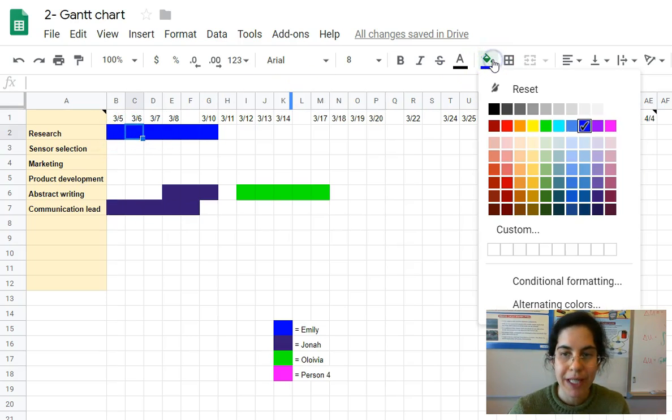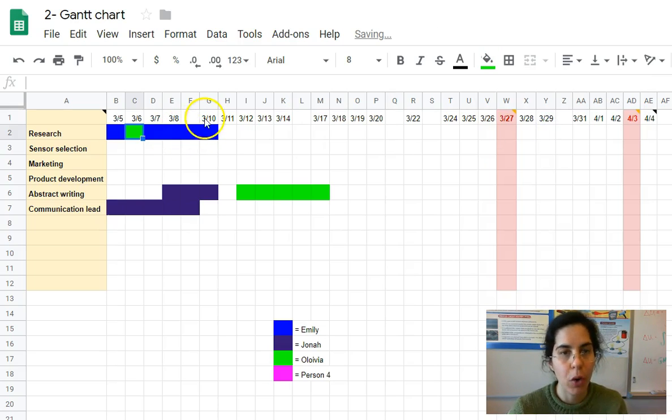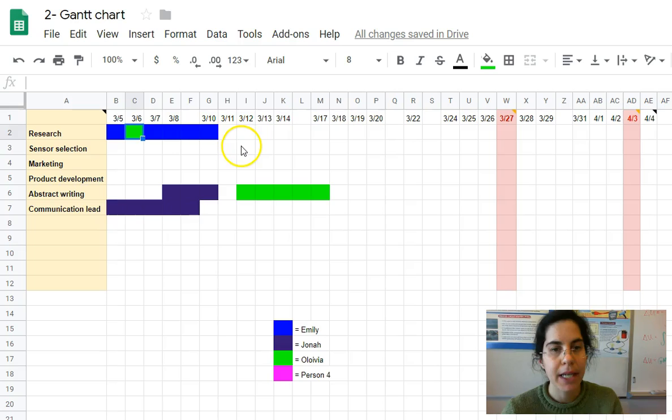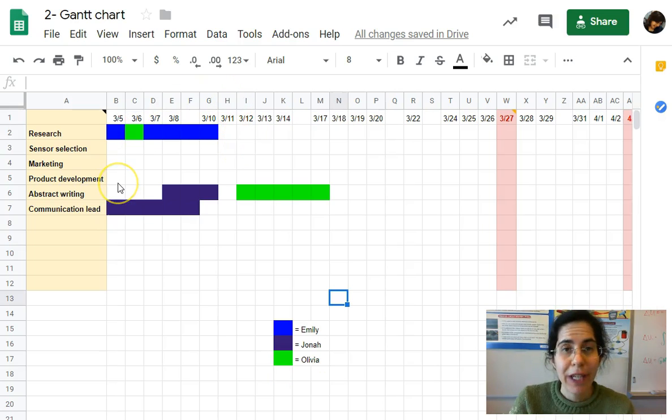You can do diagonals, you can do patterns, or you could just have the color go either or, depending on your software. You'll make 2 Gantt charts for this project over the course of the year. One for development now, and one for production when you know what you're doing in programming and the parts come in. At that point, you'll have a different chart with who is wiring and testing what.